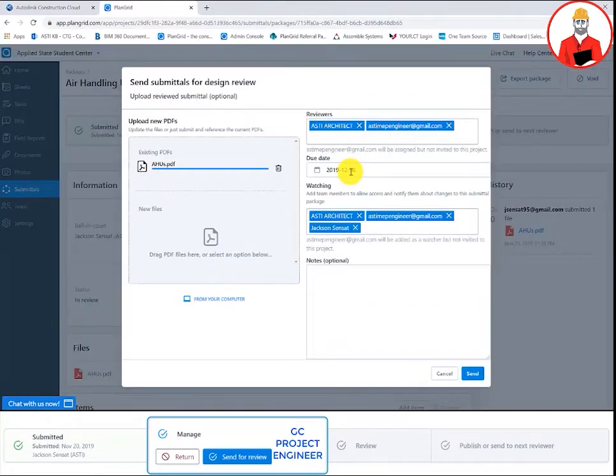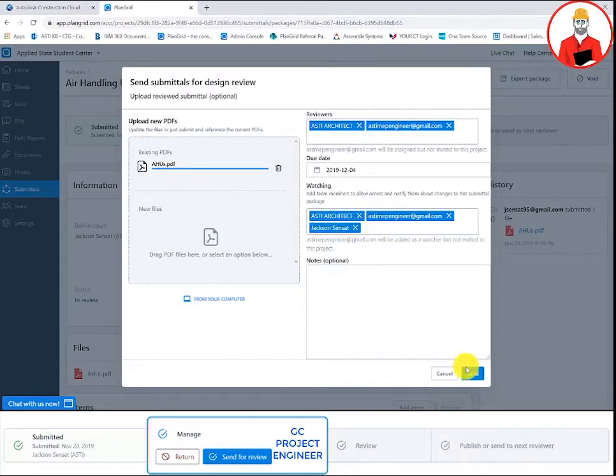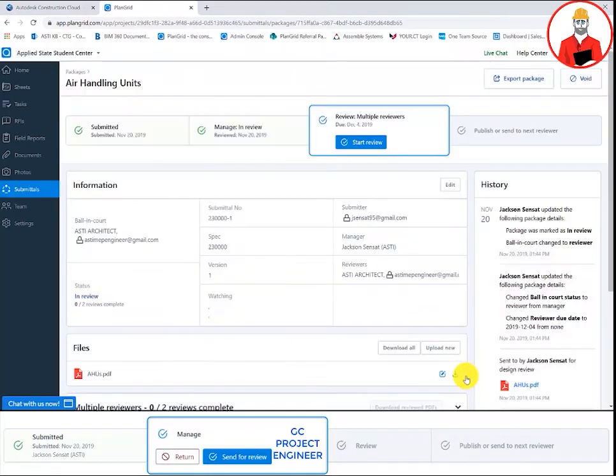The manager can assign any number of reviewers, a due date for the submittal, and multiple people to watch the submittal.